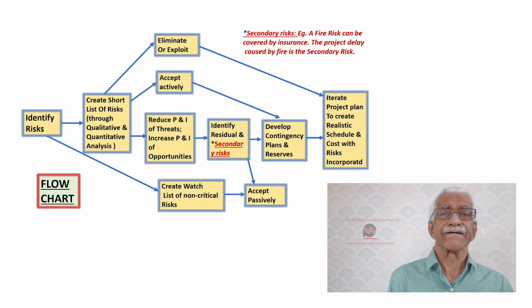Now, what happens here is that when you have created contingency reserves, you have to go and iterate the project management plan or the project plan and incorporate these contingencies into the time and the cost.